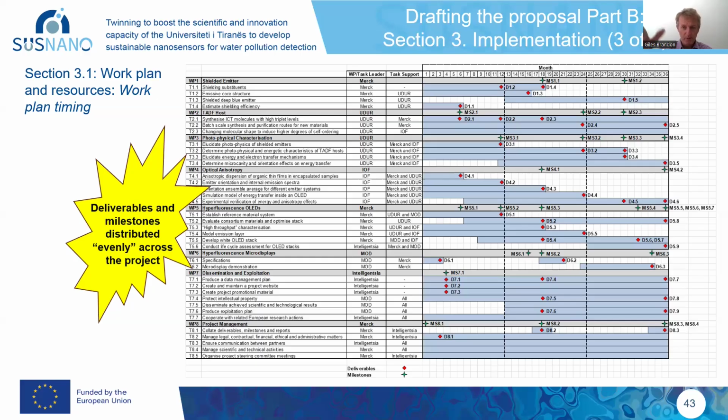Those are the deliverables. There might be reports, there might be prototypes or websites, whatever, it depends on the work package. But you see those deliverables. And I would also mark down the milestones. It depends on the project, but you could have anywhere between maybe 10, 20 different milestones, typically in a project, say 3 years in duration.